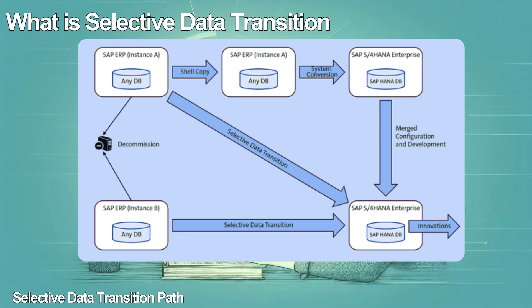In this depicted example of the selective data transition, the team created a shell copy of the first instance and carried out the system conversion of the copied instance. In the final step, the team uses the selective data transition approach to migrate the agreed-upon data — based on the customer's functional or regulatory requirements — from all the instances, and merges the configurations and the development work.